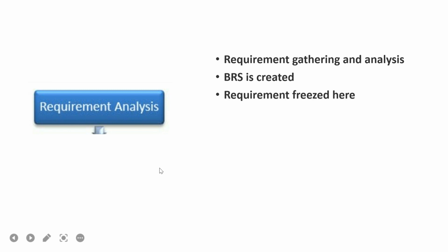In the requirement analysis phase of a waterfall model, we gather the requirements and the BRS, business requirement specification, is created here. Based on the input from the customers, we create a document, and that is called the requirement specification document. In the waterfall model, the requirements are frozen in this phase itself.